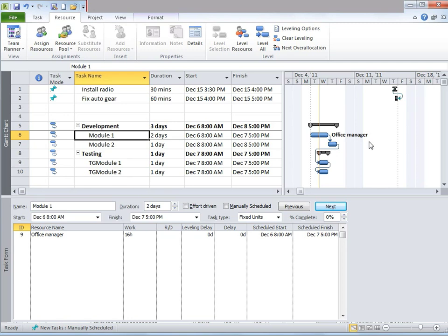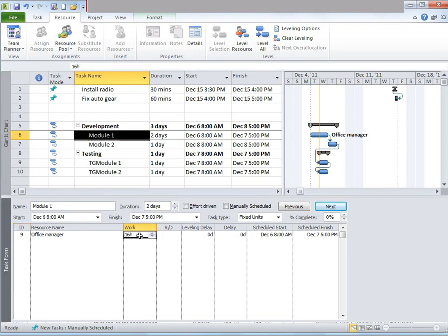Once I do that, notice Office Manager has appeared here. And in addition to that, in the task form, notice that Office Manager can work for 16 hours — leveling delay, start date, schedule, finish time — all of that information has appeared here.